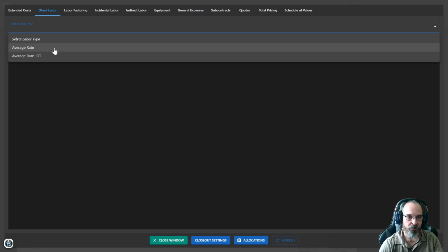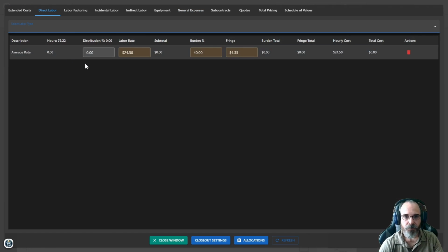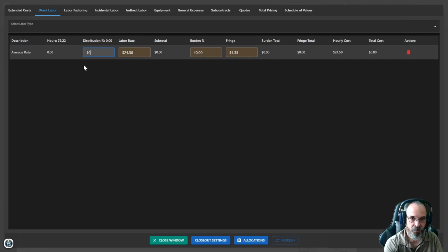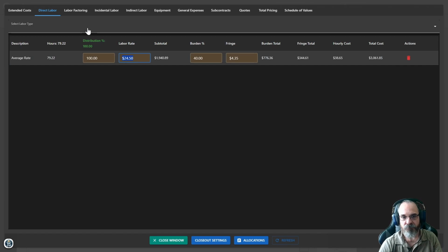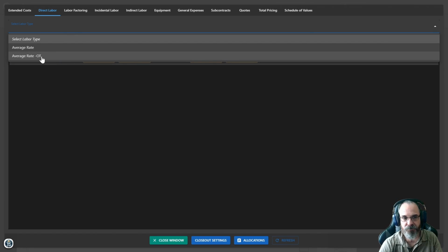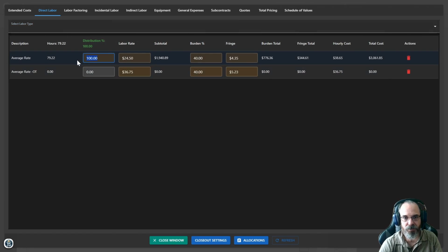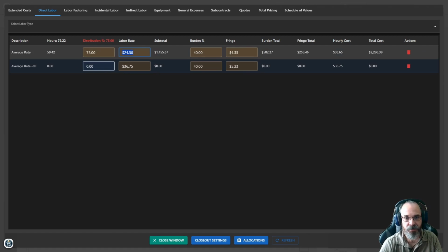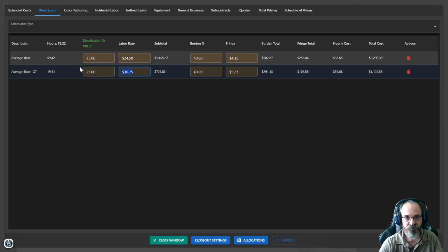And so I'll go ahead and grab average rate, and I'll make sure that I've distributed 100% of that. Now, maybe I have multiple hourly rates, like I have overtime here. So maybe I want to say we're going to have 75% straight time, and you can see that I'm not fully allocated, so it's giving me a warning, and 25% of overtime. So I can get granular with how I figure my labor here as well. And then you just set your burden rate, your labor rate, fringe if you have it. And you just would go through each tab and just add it.